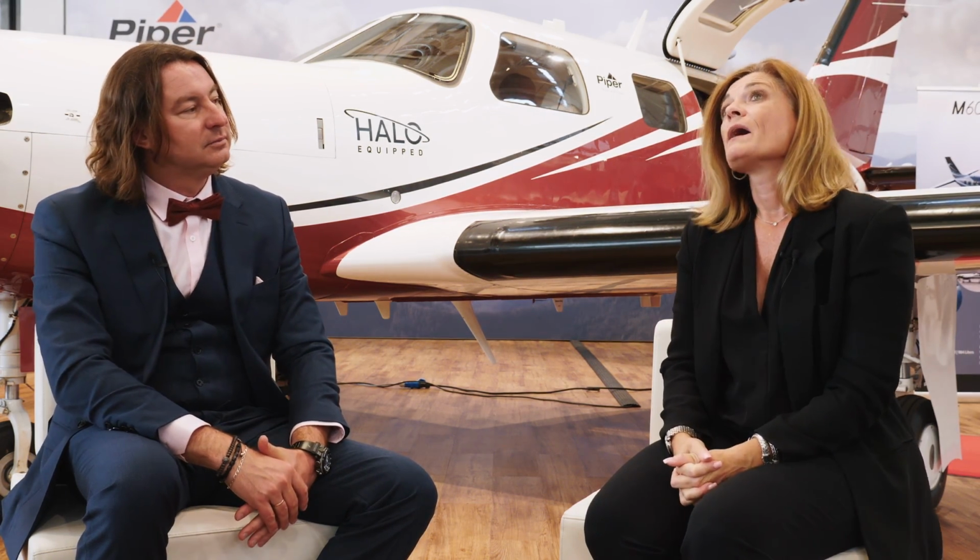So we aren't immune to the current supply chain issues. We do have issues. We've been fortunate that I believe they've been manageable. But we're faced with very long lead times on certain components right now. Certain aspects of the aircraft that maybe took us a couple weeks to get now take maybe months, if not a year to acquire. So there are some pockets of issues, but we build our schedule almost a year in advance. We kind of have visibility on what we're going to build, and as we get closer in, we narrow all of that down.